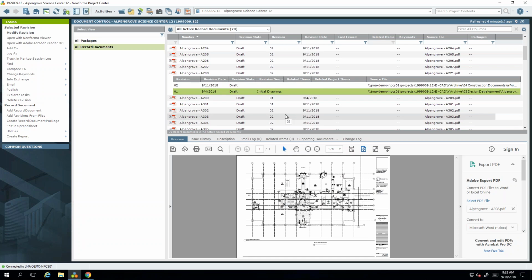We're going to start working with, so Lori, we typically issue for review, and then that's going to be revision A, B, C, D, whatever it is. But then we create folders, so it would be issued for review at a certain date, and that's what we would be linking here. So we would be linking to our network, to the drawings that are issued or approved. So we're not going to be linking to the working file. We're going to be linking to approved folders.